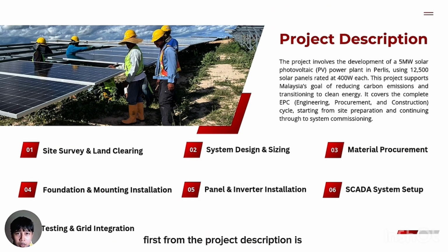Okay, first from the project description is site survey and land clearing. Second, system design and sizing. Third, material procurement. Fourth, foundation and mounting installation. Fifth, panel and inverter installation. Sixth, SCADA system setup. And lastly is testing and grid integration.